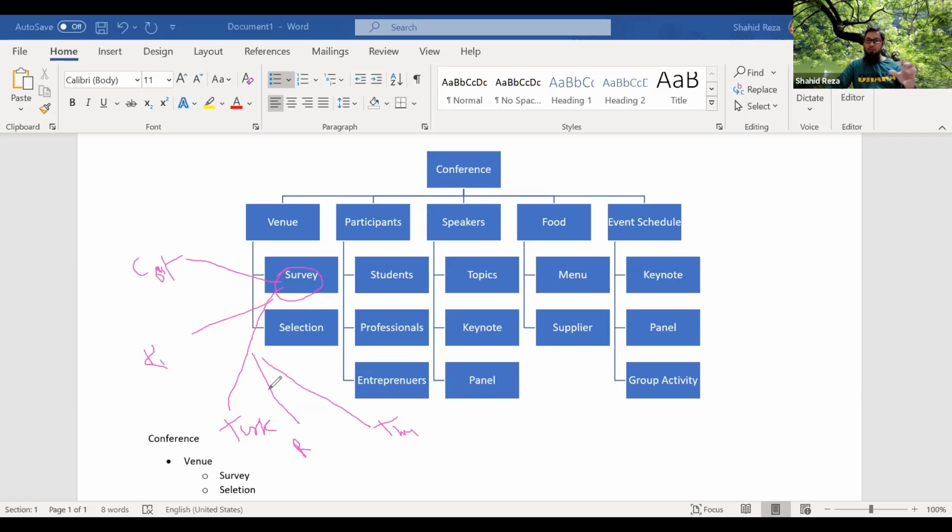So these major 4-5 components, if you can clearly estimate and clearly visualize them, at that point you should stop the breakdown or decomposing. That is enough. Don't try to decompose into very small pieces or components. Then what will happen? You have to do micromanagement. So this is another technique to understand how far you should break down your WBS. All right.